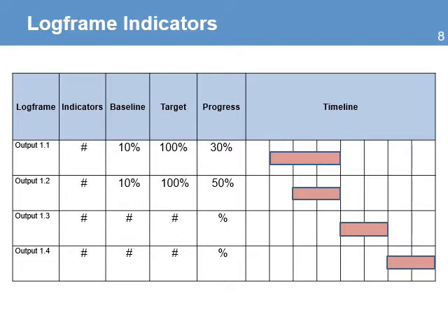For example, the plan shows that by month 3 the project should have reached 60% progress on indicator 1, but the actual data shows that only 30% progress has been made. This may require a change in the scope to add more activities or to increase the number of registered participants.